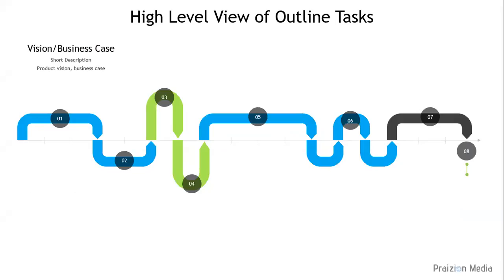It starts off with a vision of what needs to be done. It could be a product vision, it could be a need, but there's this vision, and it usually ends in a business case being worked on. In other words, conceptualization of an idea or a need, and there could be a feasibility study. In fact, a business case is known as an economic feasibility study. After the business case, there's usually an authorization, a chartering process. The chartering process, we know that as develop project charter.